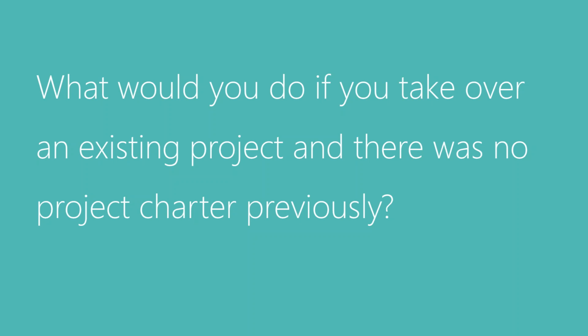I would say that a business case is usually on the program level perhaps, or maybe a huge project, you might have a business case. A business case may spawn separate projects. Same with the statement of work. If your statement of work covers everything that you want in the charter, and includes the whole project, then I'd say yes, but oftentimes the statement of work is a subcomponent of a project, and may not be overarching of the whole project.